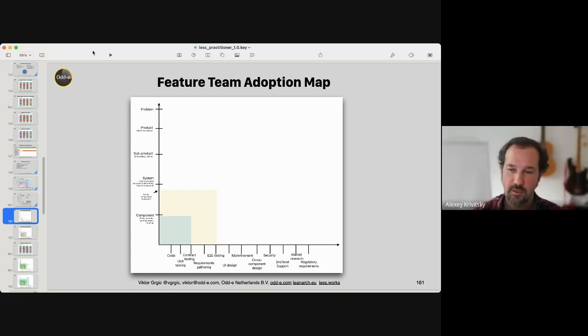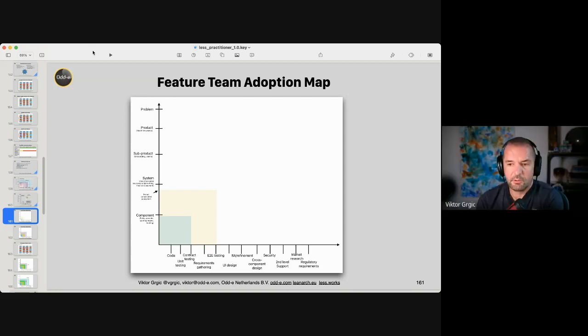Why is requirements gathering not part of the definition of done? Because you can deliver stuff and it can be completely done and the user happy without doing requirements gathering. I make up a story as a developer, just to mention an example. So it's an activity. You could have architecture, design, requirements gathering, and so on. These are all not part of the definition of done, but they are important activities, an important part of development.